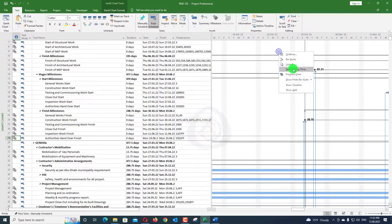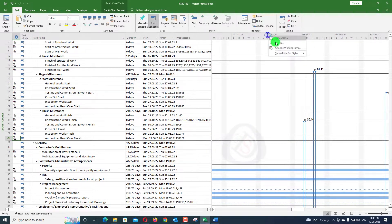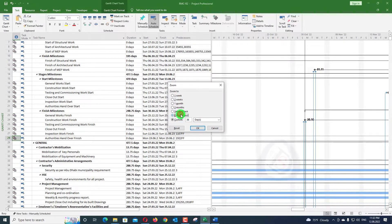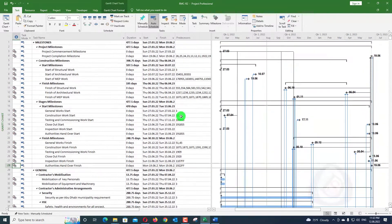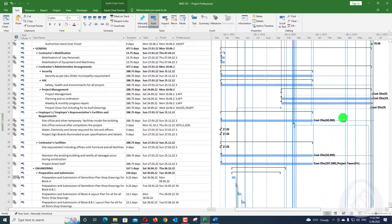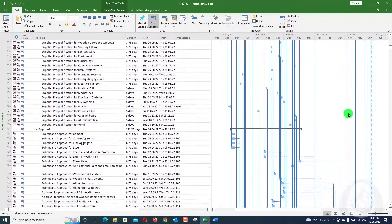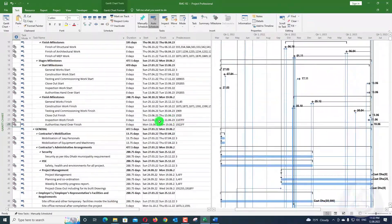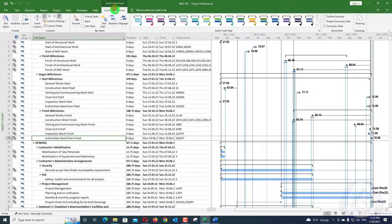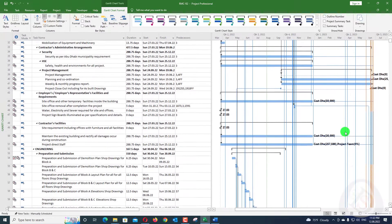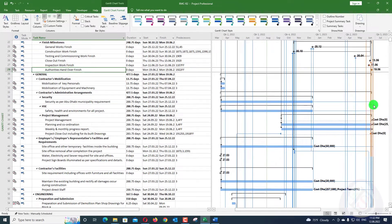Right-click, zoom to entire project. This project is very large, so we cannot easily determine things manually. When I click here, go to Gantt Chart Format and then Task Path, I will select 'Driving Predecessor.' You can see it is now selected and highlighted.